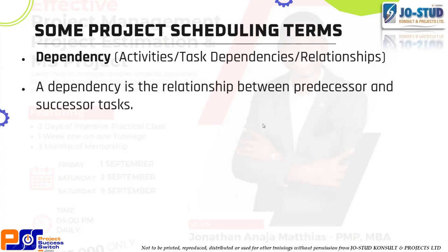After you have cast your column base that you have aligned and then set, and you have made sure they are plumb and in line, the next thing is to board your column and start doing your column form work, right? Good, great. So if you said, okay, the successor activity is now column form work, I will now ask you, what is the relationship between this activity you are doing now and the successor activity?